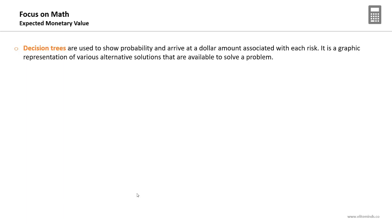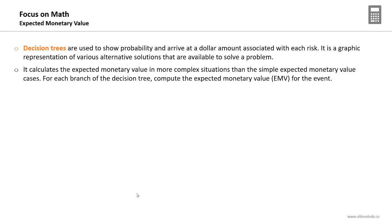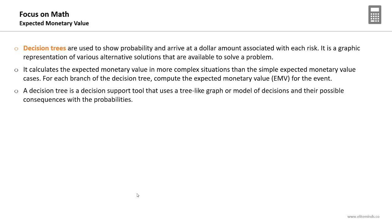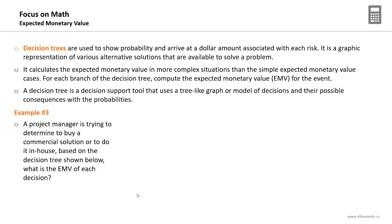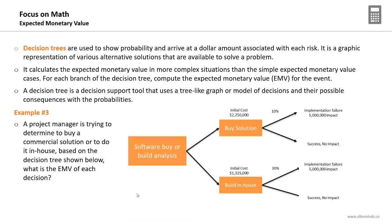One of the popular applications of EMV is decision trees. They are used to show the probability and arrive at a dollar amount associated with each risk. A decision tree is a graphic representation of various alternative solutions available to solve a problem. It calculates EMV in more complex situations than simple cases — it is a group of branches, and for each branch you compute the EMV. It is a decision support tool using a tree-like graph of decisions and their possible consequences with probabilities.